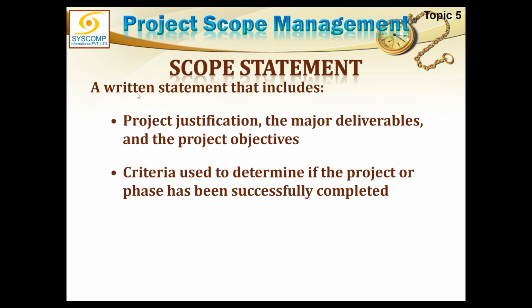Scope statement. Now, excuse me, sir. Yes, please. Sir, WBS is the place where we define phases? No, we define phases in the scope statement, but we further break it down to the work package level in WBS. You understand that?